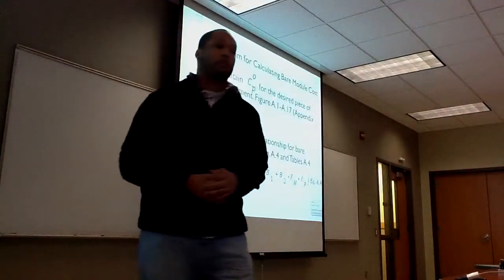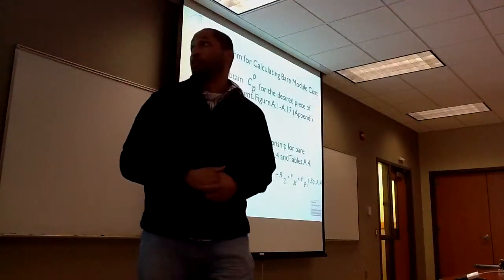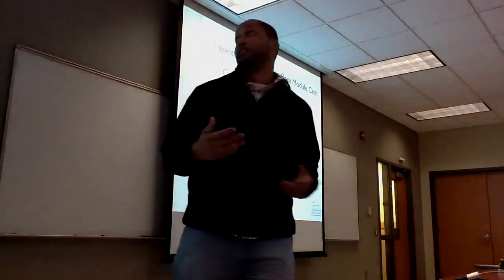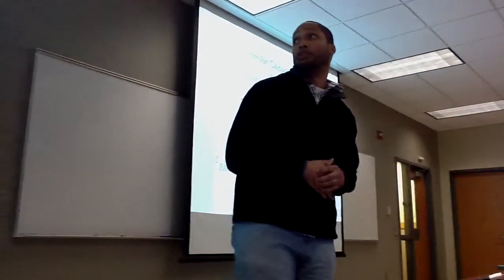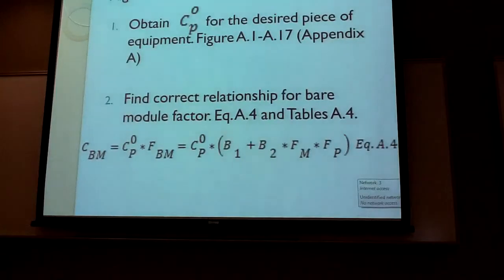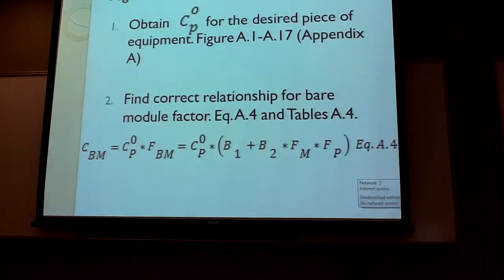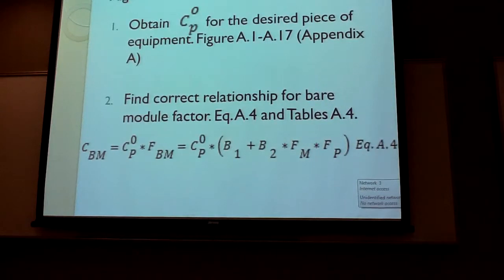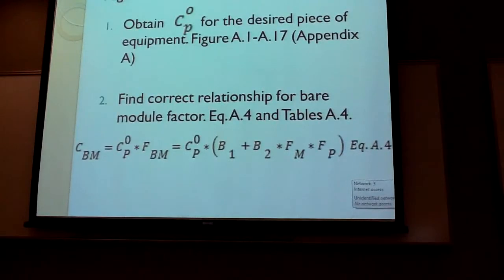The algorithm for calculating bare module cost is a six-step algorithm. The first step would be to obtain a C sub P, which is your equipment cost for your desired piece of equipment. You can use figures 8.1 through 8.17 in Appendix 8 of your book to do this.